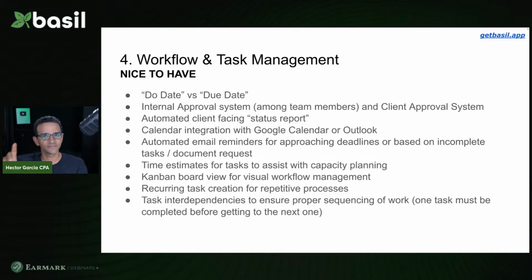okay, it looks like this is going to be a 6.25 hour job, looking at all the tasks together. Again, not required, but nice to have for capacity planning. There's a Kanban board view. If you know what Kanban is, you can go to Google and look that up. A Kanban view is a nice to have, right? Because that's one of the most popular ways to do project management and workflow management.